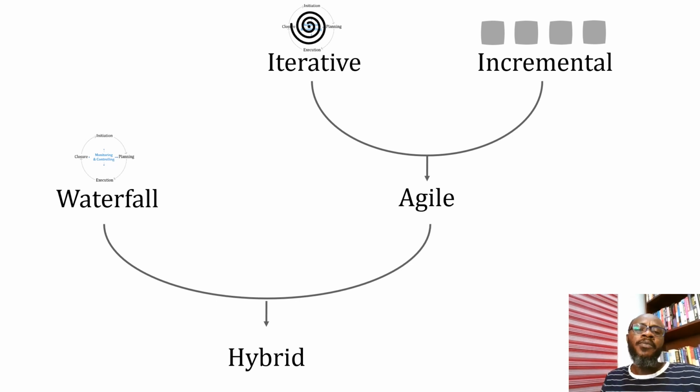You know that for waterfall projects, typically the deliverable is created at the end of the project. So if a project is commissioned and the project will take like 2 years to complete, it means that the key stakeholders or the business or the client will have to wait for the entire length of 2 years before the project is completed and handed over to them.